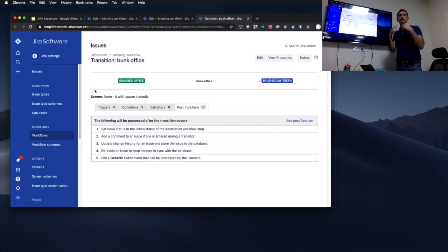So that's how Jira treats that: when resolution is set to anything, done, won't do, or whatever, it will make sure that it formats it in a different way and treats it in a different way. And at the end of, let's say, a sprint, it will take it out of the backlog also. These are the things that Jira will do to a ticket which has a resolution set. So I guess you get it, right?